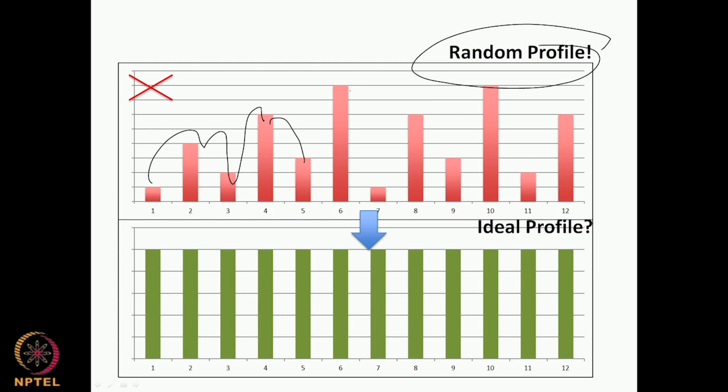In comparison, this is something which we would want to try to achieve. So in the context of what we are going to cover, we are going to try to move either our early start or a profile between early start and late start to get as close to what we are calling the ideal profile here as possible.